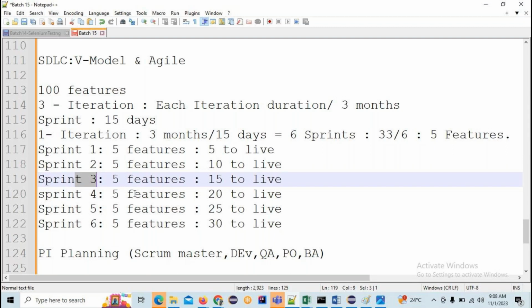Your question is why we don't use the same approach here as in Agile, like the spiral methodology. What are the applications of the spiral methodology? As I explained yesterday, it is applicable only for large projects. If we use the same thing for a small project, is it budget friendly? No. The spiral may go on indefinitely, so for small projects it's not a good thing to do.